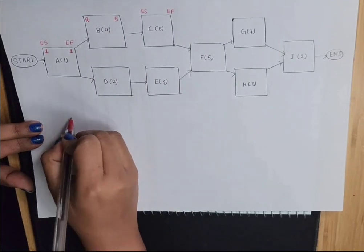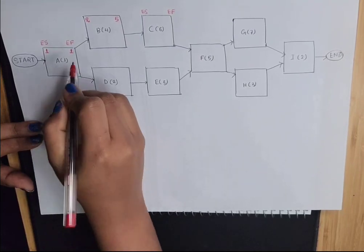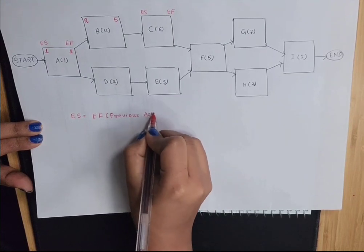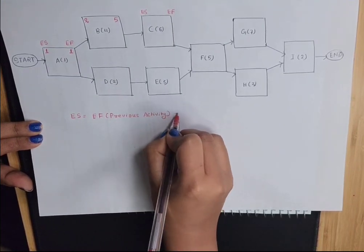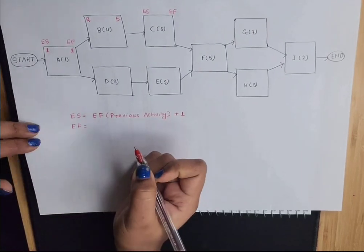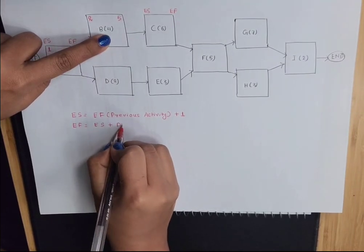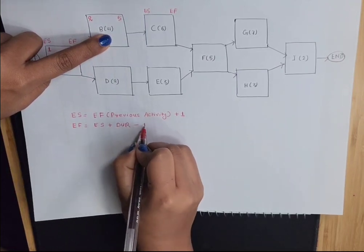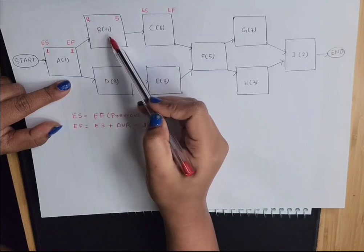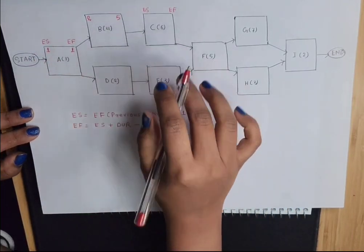Here you can see the formula. To calculate the early start, we look at the early finish of the previous activity and add one to it. To calculate early finish, we take the early start of that activity plus the duration minus one. For activity B: early start is 2, duration is 4, so 2 plus 4 minus 1 equals 5. It takes 4 days to complete, which gives us days 2, 3, 4, 5.